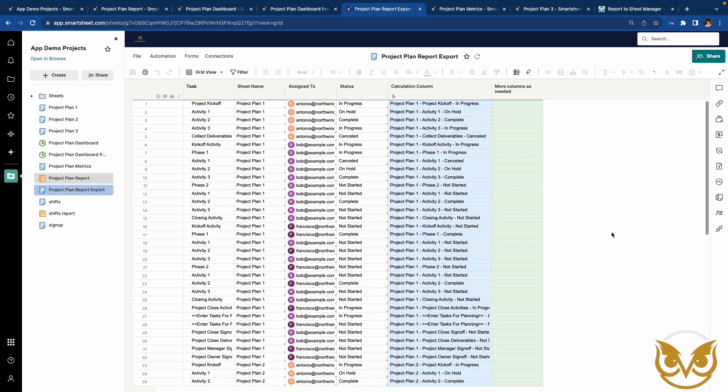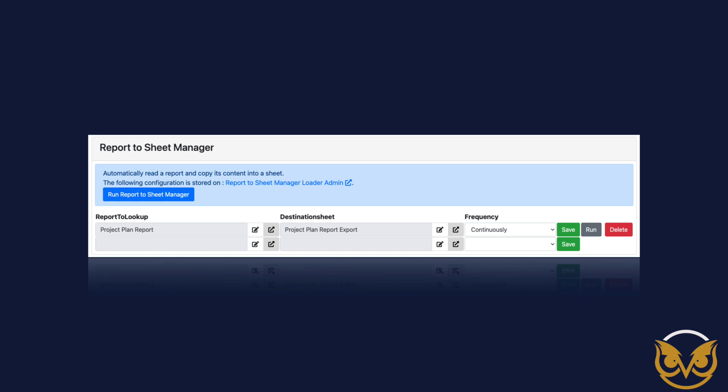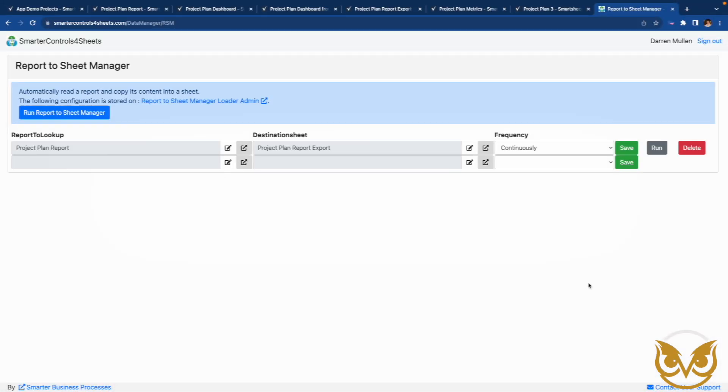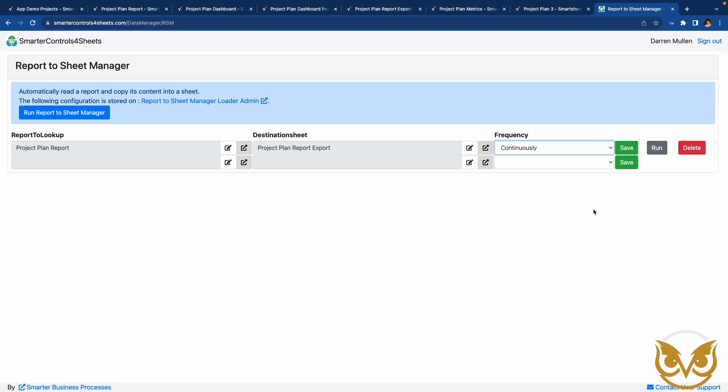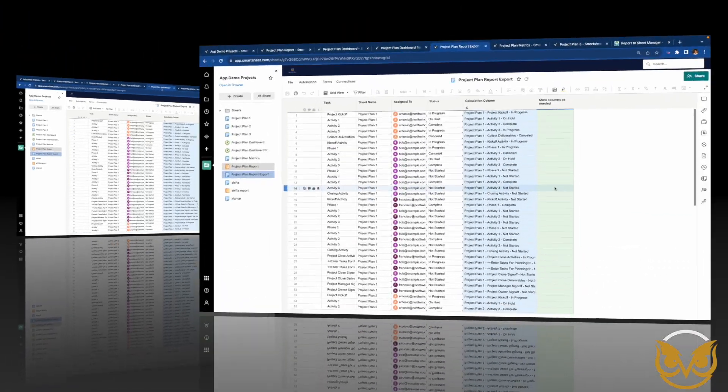This sheet is being updated periodically from the data in the report using the Smarter Report to Sheet Manager. How does this work? Let's see. This is the control panel. It is very simple and intuitive. Simply choose the source report and the destination sheet. The configuration will run periodically. Continuously is the most frequent and it runs about every 20 minutes. You can also run once a day or once a week. Additionally, you can choose to run the configuration manually to immediately update the destination sheet from the source report.